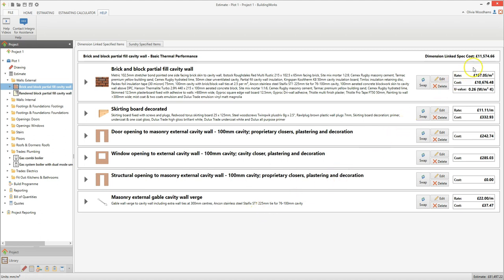Here at the top of the screen you can see the total cost of all the walls of this specification. As you look down the screen you'll see a detailed breakdown of all the specified assemblies linked to the dimensions you've entered for the brick and block cavity walls. The brick and block partial fill cavity wall assembly includes brickwork, blockwork, insulation, cavity ties, plastering and decoration — all linked to the wall area dimension. BuildingWorks gives you a rate per square metre for this assembly alongside the total cost.